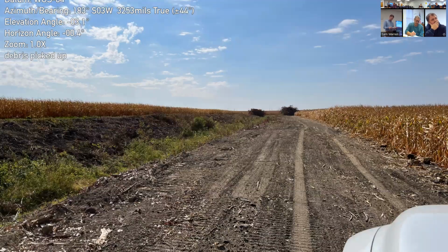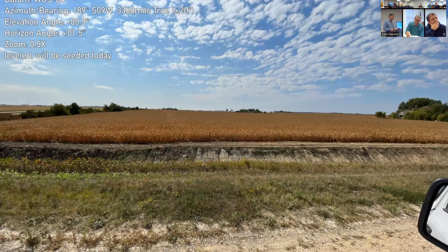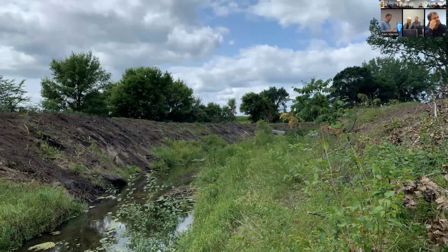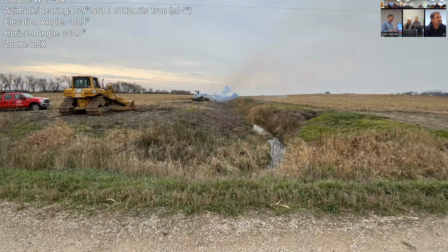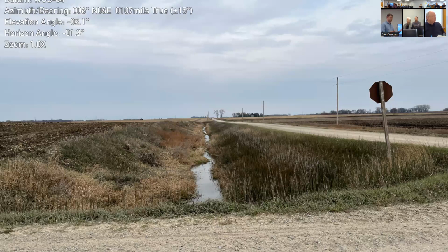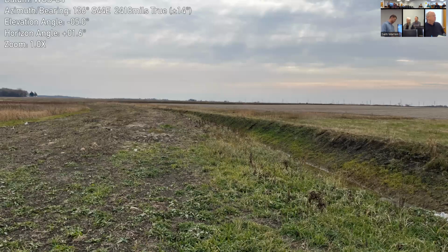There was one other change order where we added about 20 tons of riprap to the job that we had not called out before. The work was completed during the summer. They did wait to burn some of the trees until after crops were out. So technically it did go over completion date. However, we're not recommending completion damages because that work was done just to avoid burning out in the cornfields. All the main work was done.